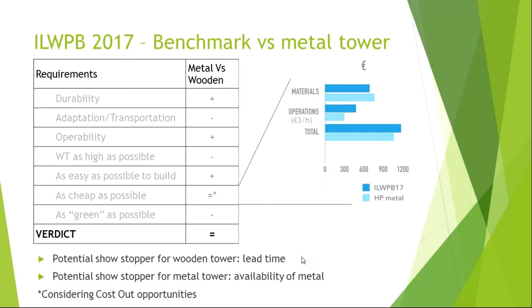But you sell it, so the materials, how much do they cost? If you sell it, you need to consider also the effort to build it, right? Exactly. That's including a little bit of the welding as well, welding the pieces together, welding the flanges on the metal tower. And time, for me, well, there's shopping time in buying all the materials, but actually putting together a metal tower takes 4 hours. For a 12-meter tower, in 4 hours you've built your tower. Well, if you're a good welder.